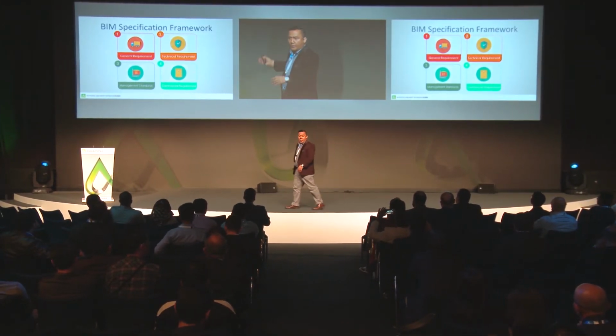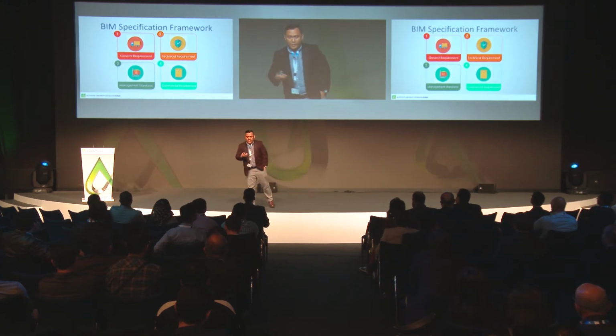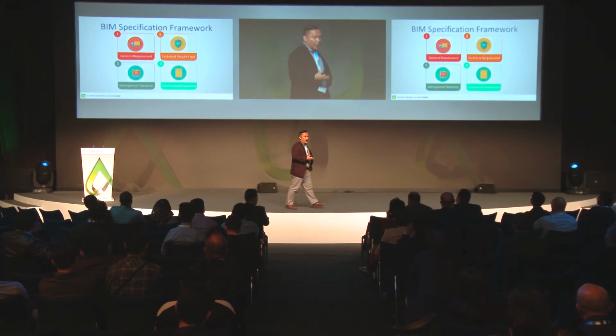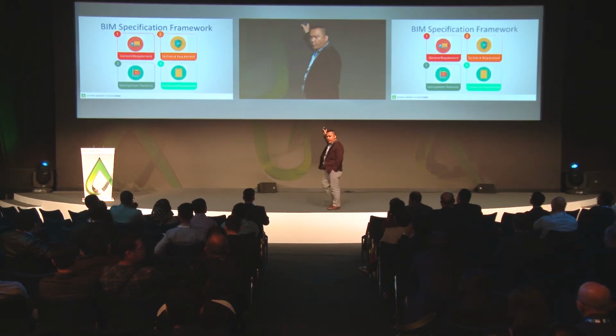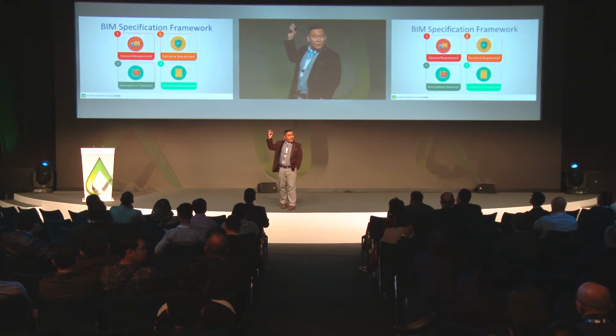Revit in Singapore is not a contractual document. It is for the purpose of regulatory submission. The contractual document is actually the BIM specification, and at the end of the day, you have to comply with all the requirements written in the BIM specification.